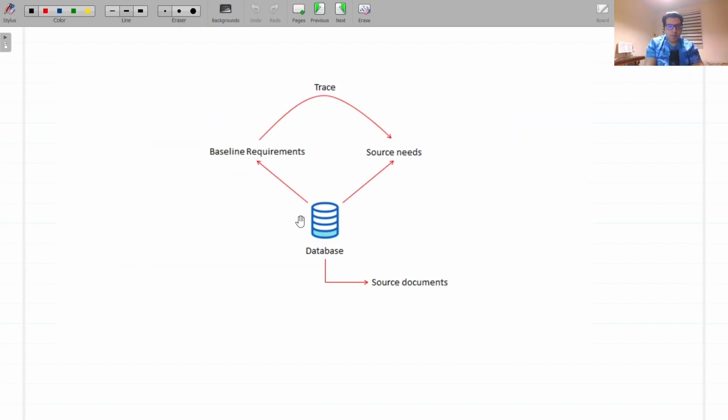Initialize the requirements database. It is essential to establish a database of baseline requirements traceable to the source needs and subsequently to system requirements to serve as a foundation for later refinement and or revision by subsequent activities in the SE process. The requirements database must first be populated with the source documents that provide the basis for the total set of system requirements that will govern its design.